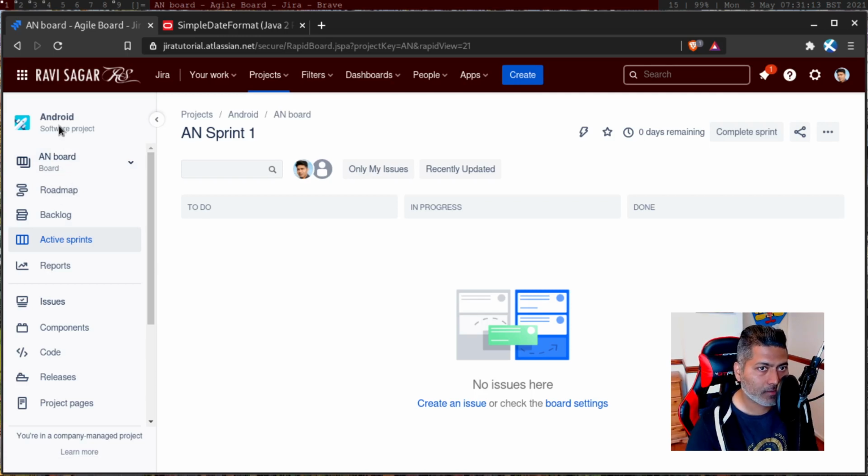So this project is already there in Jira, and the CSV import feature works really well, but you need to have those statuses and whatever you're trying to import. If you're importing something which has existing value, like those drop down fields, for example, things like priority, those priority statuses should exist in your Jira instance already.